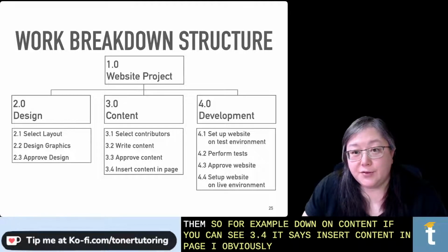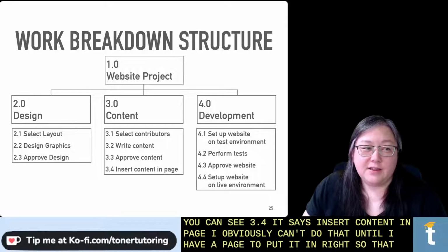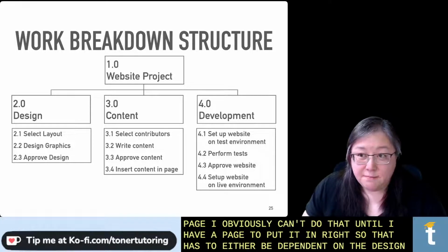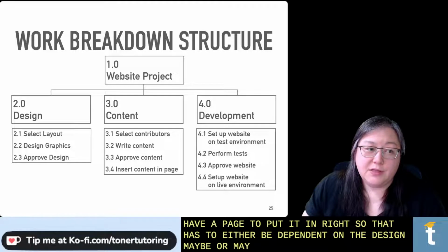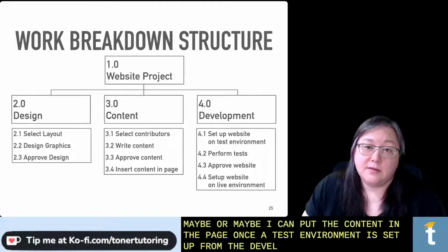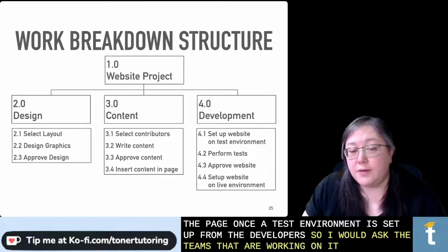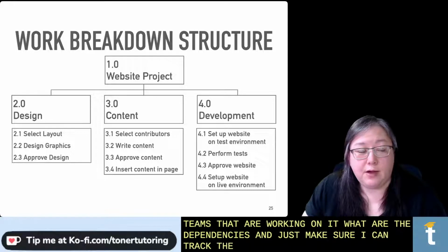I obviously can't do that until I have a page to put it in, right? So that has to either be dependent on the design, maybe, or maybe I can put the content in the page once a test environment is set up from the developers. So I would ask the teams that are working on it, what are the dependencies, and just make sure I can track that really well.